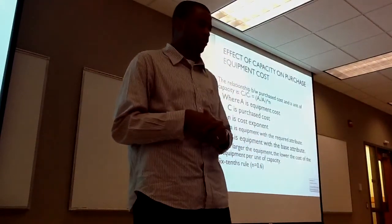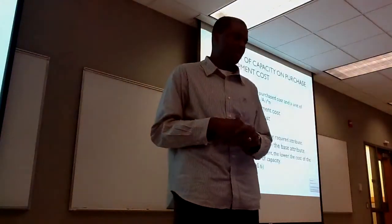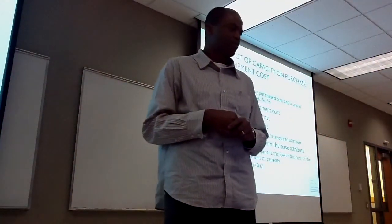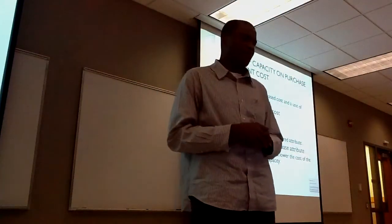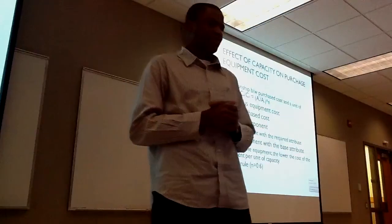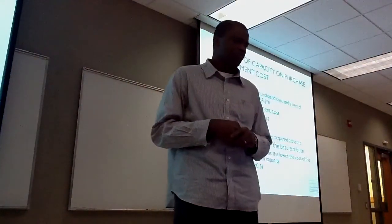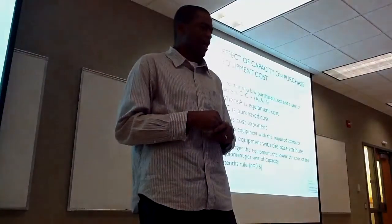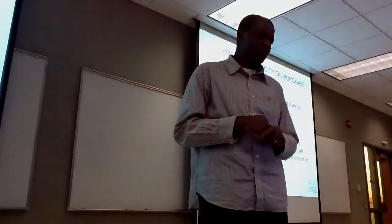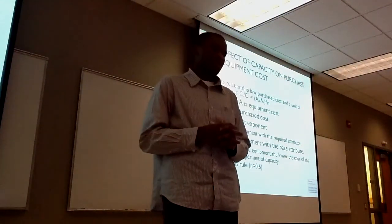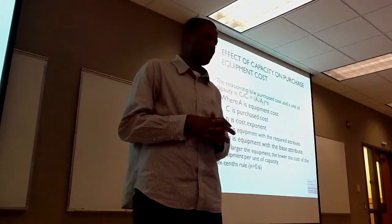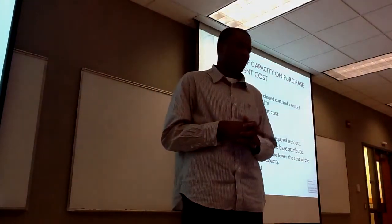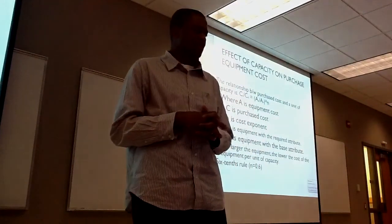The effect of capacity on purchased equipment cost is given by the relationship: C_A / C_B = (A_a / A_b)^N. Here, N represents the sixth-tenths rule, whereby N is replaced by 0.6. C is the purchased cost, A is the equipment capacity attribute, and N is the cost exponent. A refers to equipment with the required attribute and B to equipment with the base attribute.